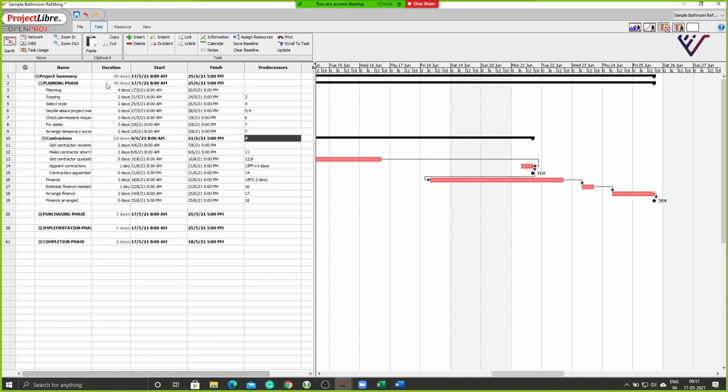I think the first activity that all of you try to do is add in your tasks and put in the durations. Then you start creating the links between each of them. So you create tasks, subtasks, and add the durations. So you will have your frame ready. That is what I had asked in the first exercise. So if you have that data ready, you can just copy paste it into this, and then you can start working on the creation of linking of predecessors.